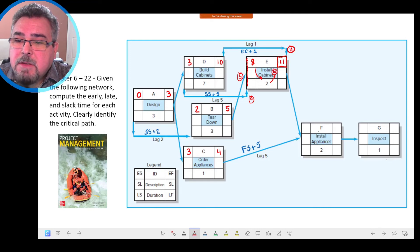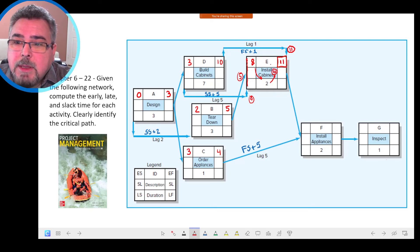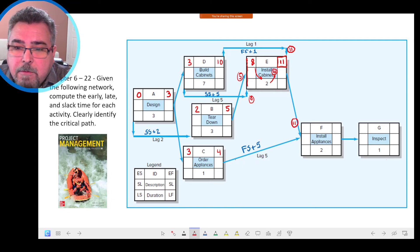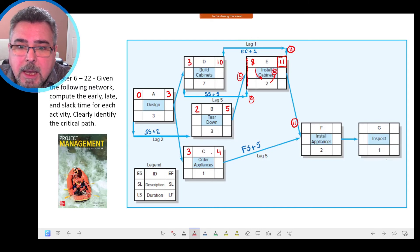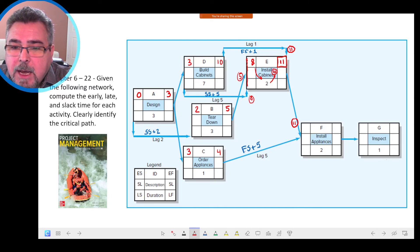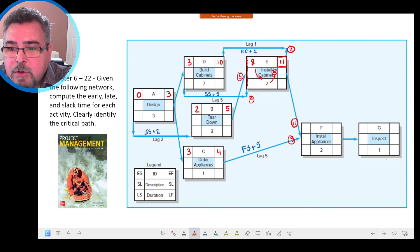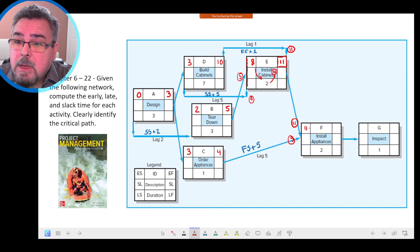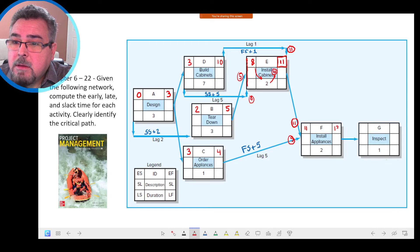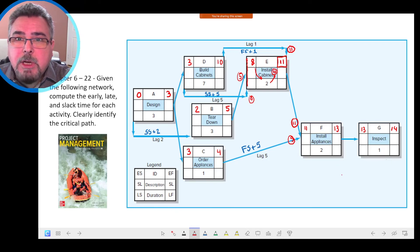Activity F has two conditions. One is a Finish-to-Start from Activity E: that gives 11. Another is a Finish-to-Start from C with a lag of 5: 4 plus 5 = 9. We have two conditions — 11 and 9 — and because it's a forward pass, we take the longest: 11. So 11 plus 2 = 13, and 13 plus 1 = 14. The project duration is 14 days.